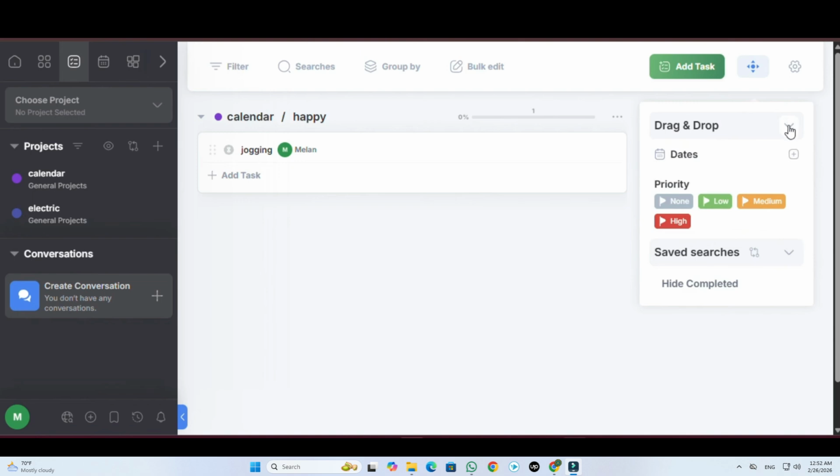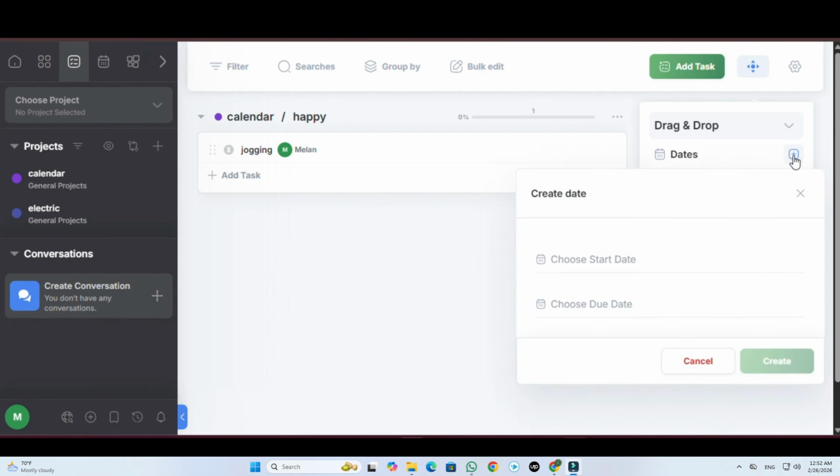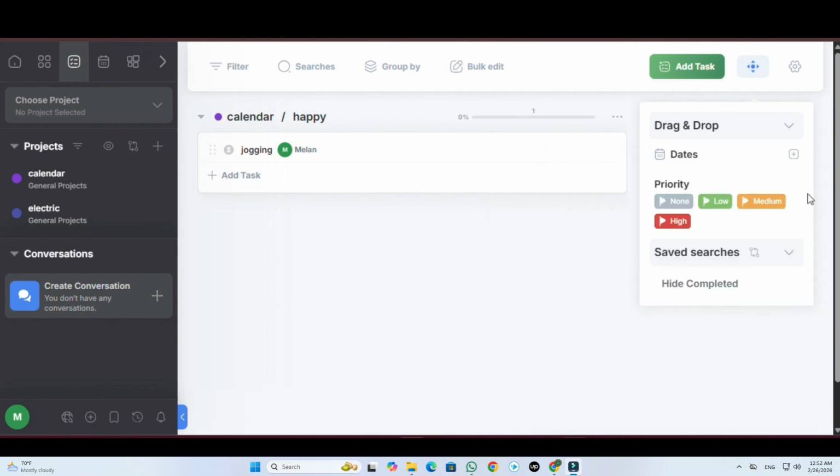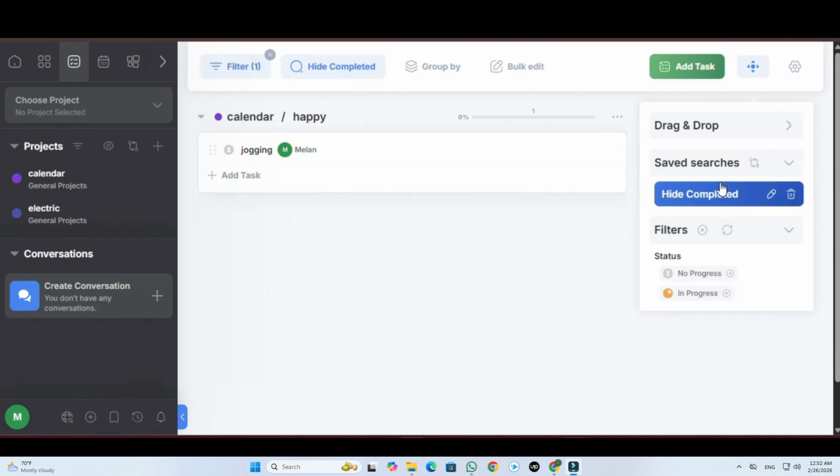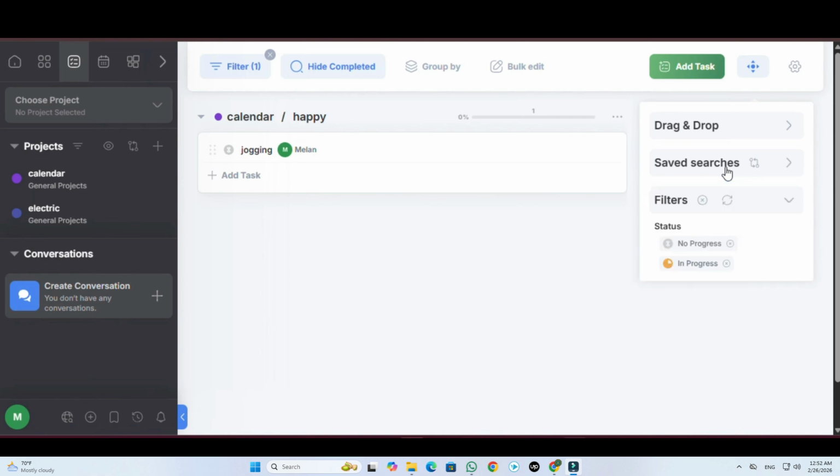Streamlining workflow with templates. If you frequently manage similar types of projects, Freedcamp's templates feature can save you a significant amount of time. You can create a template by setting up a project with all necessary tasks, roles, and configurations, then saving it as a reusable template. Whenever you start a new project, you can apply this template to instantly duplicate your preferred setup. This is especially beneficial for teams with standardized workflows, such as agencies or development teams.